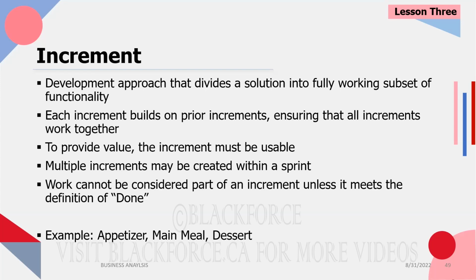Work cannot be considered part of an increment unless it meets the definition of done. So when you're saying, oh, yes, we completed this increment, right? That increment has to be done. There's something called definition of done, meaning these 5 user stories that are in this increment, this is what needs to happen for us to say, you know what, we delivered.